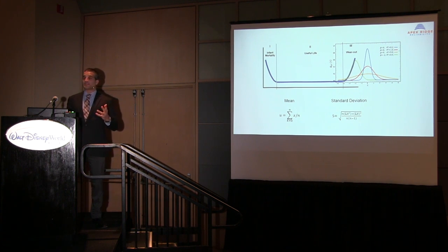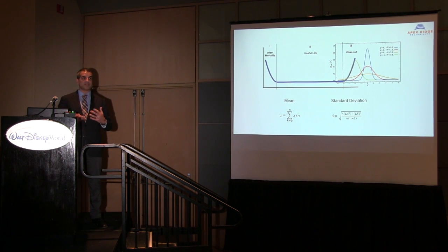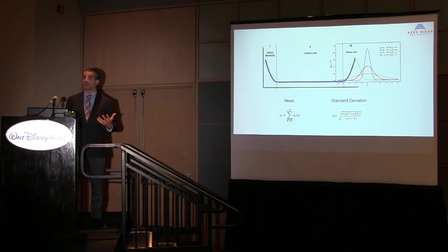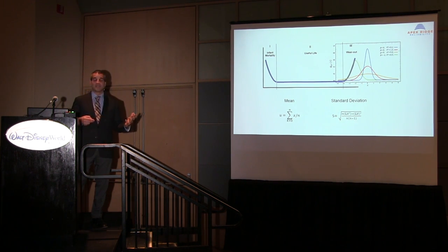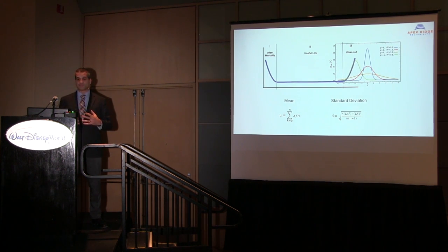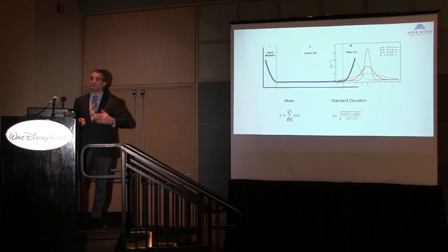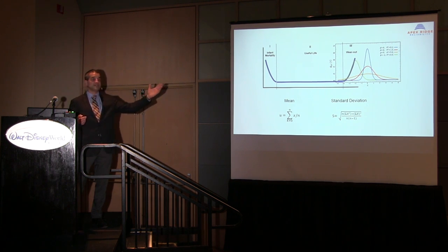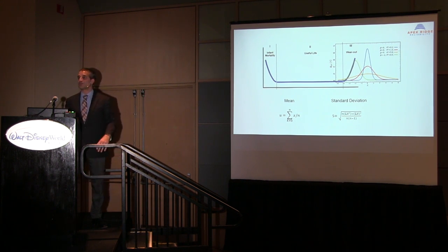And a wear-out test is, a lot of times we're able to characterize it with an accelerated life test, right? So you have a product that may be supposed to last 5 years. And we come up with a test where that could be demonstrated in a few weeks. We find an acceleration model that works. And the project managers want to say, okay, when you demonstrate the 5 years, we can finish the test. Now, anybody who knows anything about a bell curve knows that if you had the regular nominal product and you stopped then, that means technically 50% of the products are going to fail before that point in time, before the 5 years. That's not the answer you want. That's not of any value. We need to run till they all fail. So then they say, when are they all going to fail?